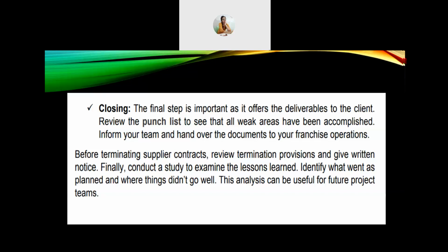So before terminating supplier contracts, review termination provisions and give written notice. Finally, you have to conduct a study to examine the lessons learned and identify what went as planned and where things didn't go well. So this analysis can be useful for future project teams.